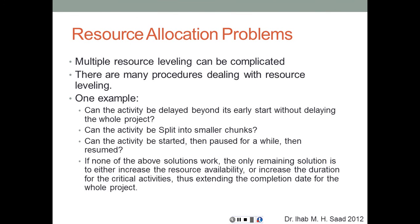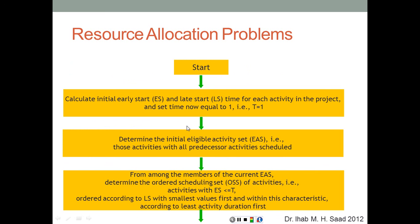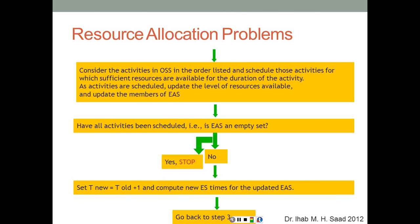A flowchart shows the resource allocation algorithm: calculate initial early start and late start for each activity, determine the eligible activity set with all predecessors scheduled, and proceed accordingly. With two or more resources to allocate and level simultaneously, software is typically needed due to the large number of permutations involved. This concludes the brief introduction to resource allocation; a numerical example will be posted for further practice.